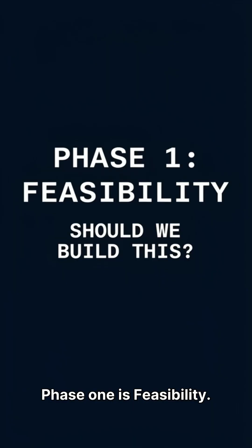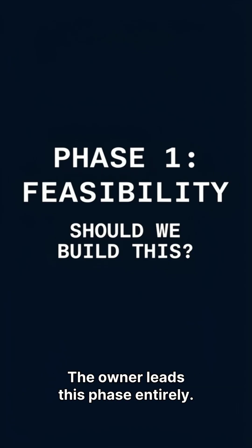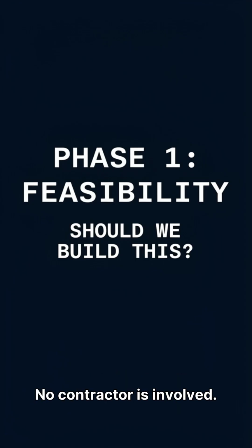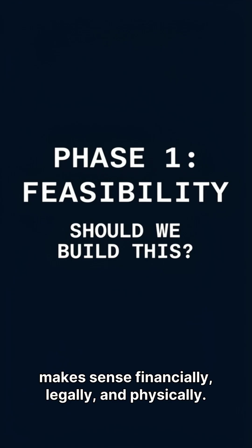Phase 1 is feasibility. It answers one fundamental question: should we build this at all? The owner leads this phase entirely. No architect has been hired yet. No contractor is involved. The owner figures out if this project makes sense financially, legally, and physically.